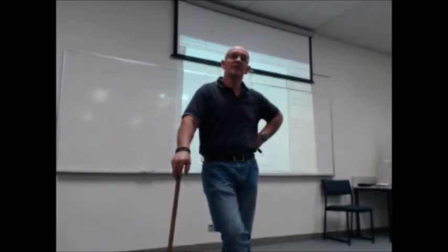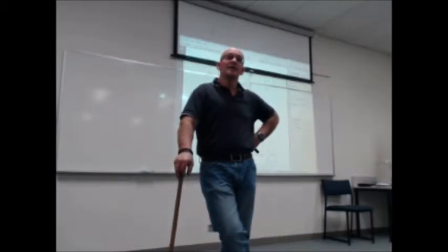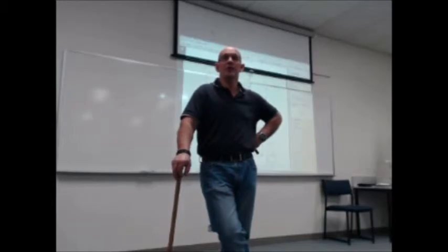Why is it higher than 30 or 40 bucks? You reckon he's only going to get five square meters done in a day instead of 10? Porcelains are harder to cut. Is he going to be doing a lot less meterage per day? Well, barter with him. You're the one paying the bill. You just get a couple of quotes. It's not hard. Just ring around.